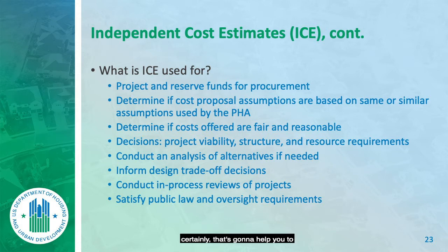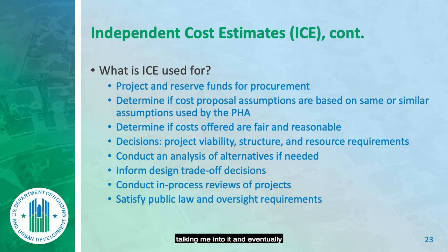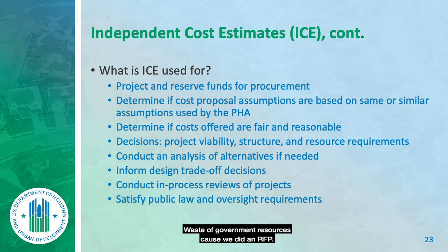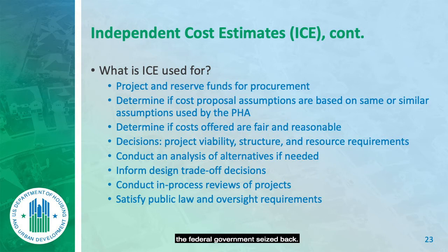When you estimate how much something is going to cost, that helps you reserve funds for the procurement. Prior to doing a quote, bid, or RFP, you must ensure that funds are in the budget — you must not go forward with bids without it. One time a staff person talked me into it; eventually my authority received a $5,000 fine from HUD for waste of government resources because we did an RFP that was never approved.